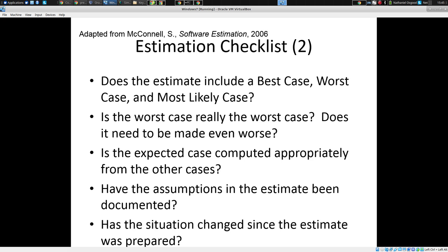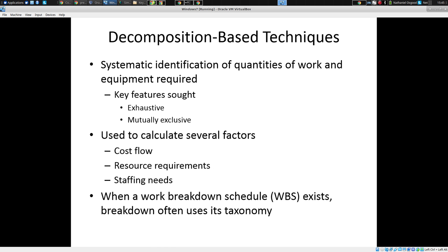Okay. So, as Mason referred to, one key for providing better estimates is to go through a process that's termed by many, including companies here in town, as decomposition. It involves taking what could be a fairly large element of work, as initially described, and systematically parsing it out into its natural steps. So we break down what's needed into a set of particular tasks in our minds, and then we estimate those.